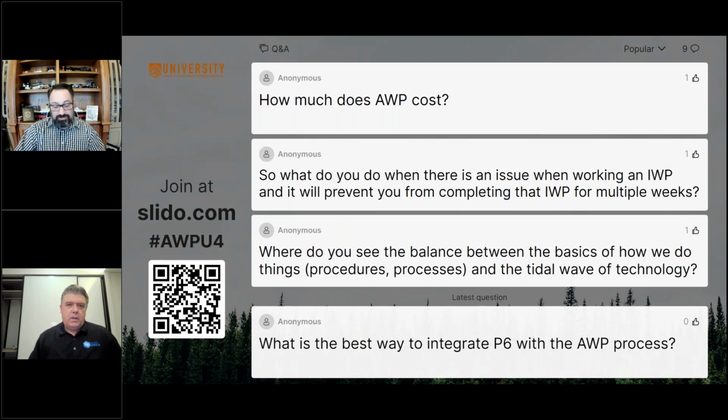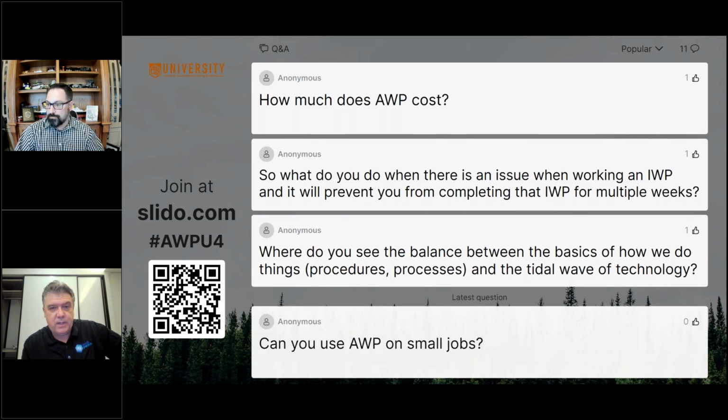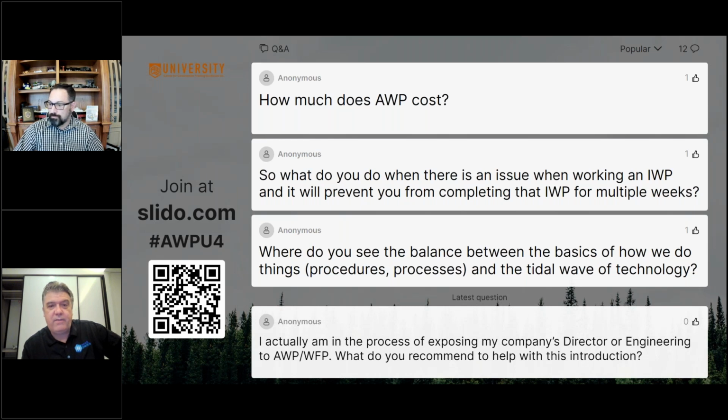But there is an upfront cost, right? And there are toolkits that give you a good estimate. But again, coming back, choosing the right tool, your planner count goes way down, right? You need to have a dedicated team for supporting the technology, and you need to have a dedicated team for using the planning tools. But in that case, it's not adding costs for the planners. You're just shifting from other people that would be doing it very poorly in the field. So it's actually, again, saving money.